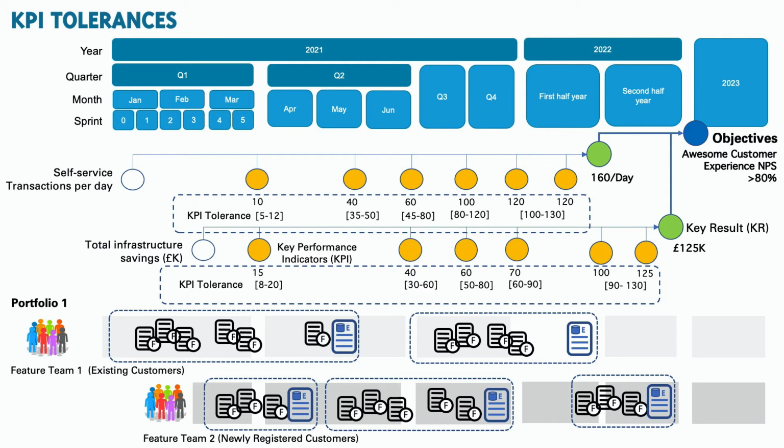As long as the Agile team's performance falls within the agreed tolerances, they're empowered to make the necessary changes to their makeup, priorities and implementation approaches. Should an individual Agile team discover their actual performance falls outside one or more of their agreed KPI tolerances, they must then immediately follow the agreed escalation process.